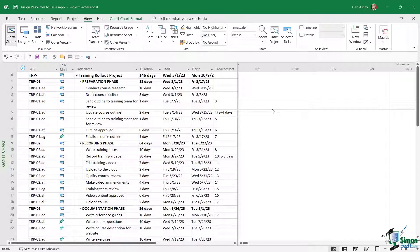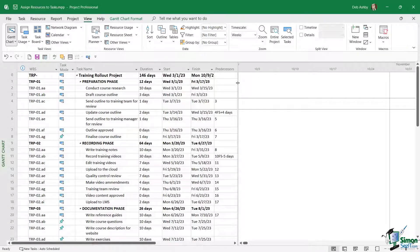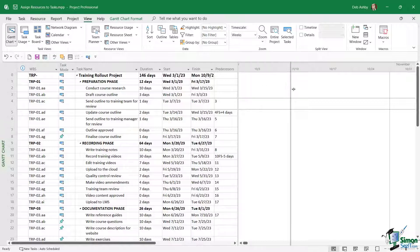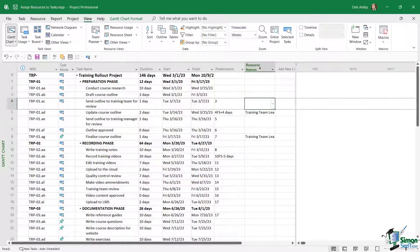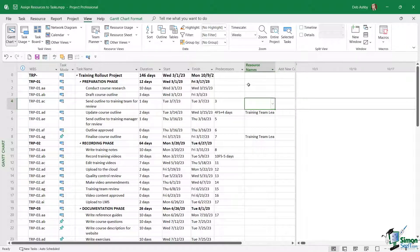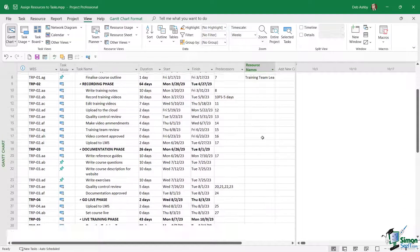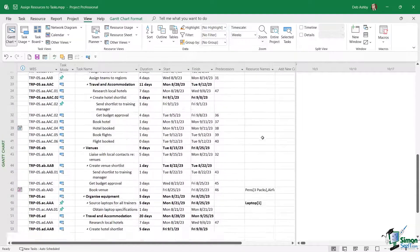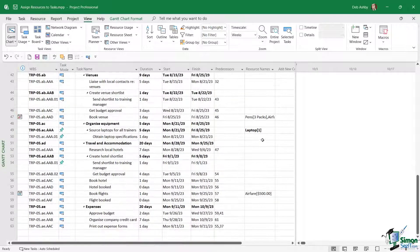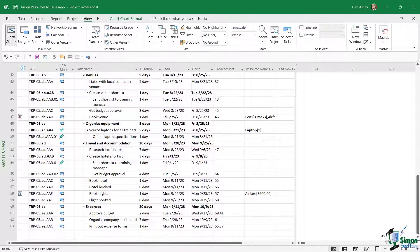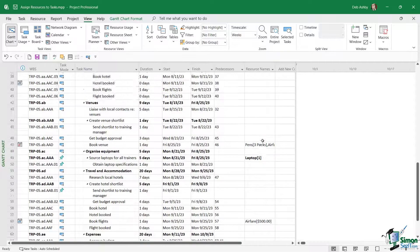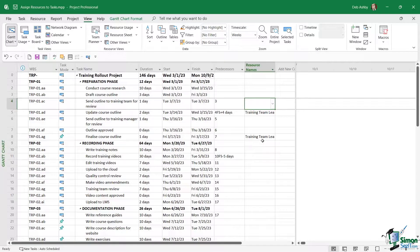Currently you can see the entry table. If I grab the divider just here and drag this across a little bit, it's going to reveal another column underneath which is the resource names column. This is where we can see any resources that are currently assigned to our tasks, whether that be a work resource, a material resource, or a cost resource.